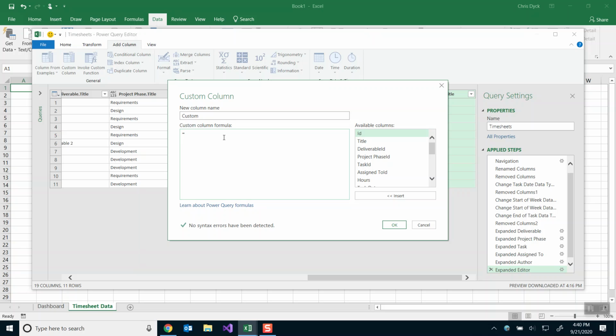Okay, this is for a class, but if you're watching this in general, we have a budgeted set of hours for our teams in class. Each student has 5 hours. All right, multiply that by the number of students and you'll have the weekly budget. So if you have 4 people in your group, that would mean that you have 20 hours to accomplish your task. So we're going to say 20 is our budgeted hours. Okay, so I'm going to call that our weekly budgeted hours.